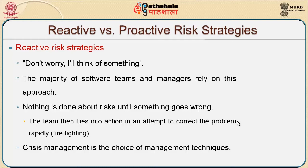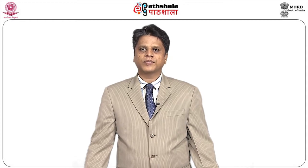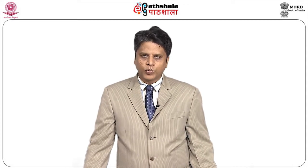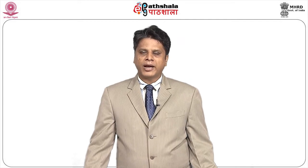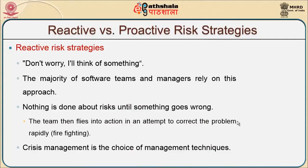We will now differentiate between reactive and proactive risk. Reactive risk strategies are ones which do not worry upfront and think of alternatives in case some risk happened. The system or the people managing the risk will take care of alternatives. The majority of software teams and managers rely specifically on this reactive risk approach — once something has happened, what is the reaction this risk strategy has to provide? Many times, management looks after this kind of control rather than going for a proactive approach.